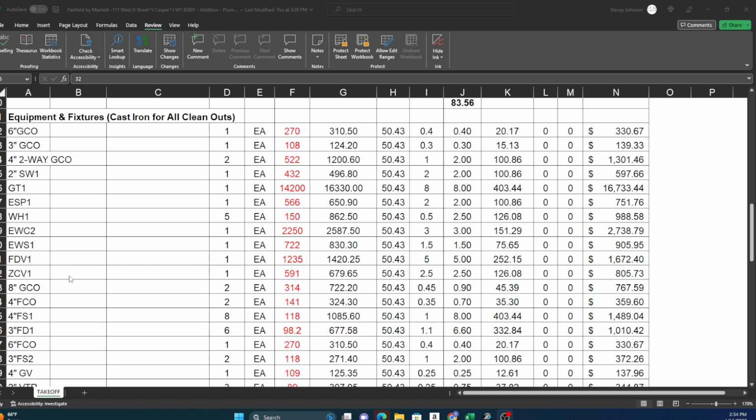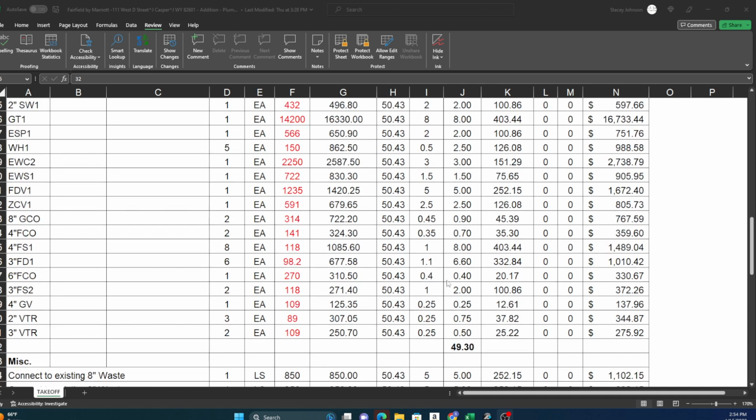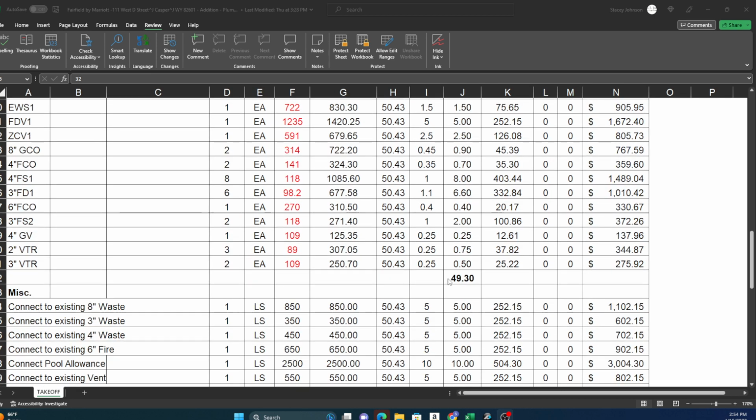Now, when it comes to the actual equipment, it really depends on which equipment we're talking about. In terms of floor sinks or whatever, you could consider that a finish, just the way a sink is a finish in the bathroom, but the piping that brings it up, that's the rough end. Okay, and so you'll be able to just take out these numbers as they apply and come up with your schedule for your rough end time, and then your schedule for your finish time.